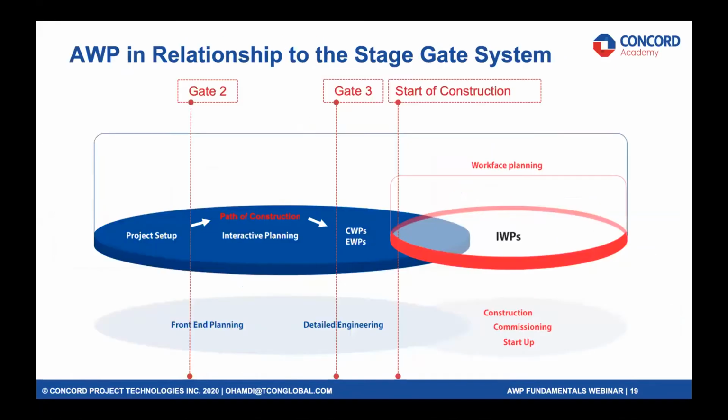Now, with that breakdown, what happens is that we translate that breakdown into a work breakdown structure, into a numbering structure that actually is propagated across the entire documentation of the project, from procurement to engineering to field to all sorts of documentation that feeds into these packages.